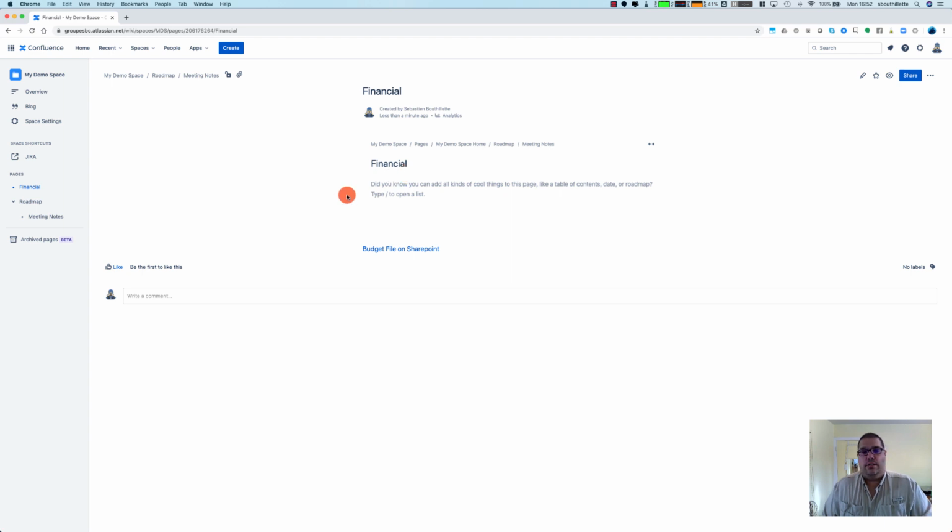So I would create myself a page for the decision log, where I would list all of the decisions we've taken during the project, so that a couple of months down the line, when people wonder why did we do this or that, or why did we not do this or not do that, we have a record of that.